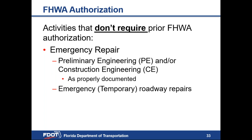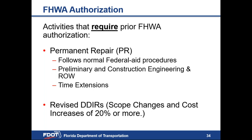Activities that do not require prior FHWA authorization are your emergency repairs, including preliminary engineering, construction engineering, and emergency or temporary roadway repairs to restore essential traffic. Activities that do require prior FHWA authorization are your permanent repairs, which follow normal Federal-aid procedures, and include preliminary and CEI, right-of-way, and time extensions. A revised DDIR will be required for a scope change or a cost increase of 20% or more.